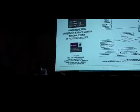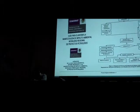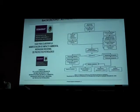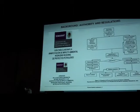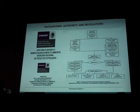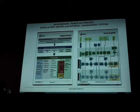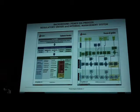This particular process does incorporate the local and national regulations, particularly in Mexico. That's one of the first things that a company like PEMEX has to consider. What are the regulations that govern the environmental impact assessment process? SEMANAP, which is the local Ministry of Environment, has a very clear process, guidelines, and even very specific processes and procedures on how to develop and deliver this environmental impact assessment statement. So that's one of the major considerations — any company working in any country, and particularly PEMEX in Mexico, has to combine that with their internal management system.